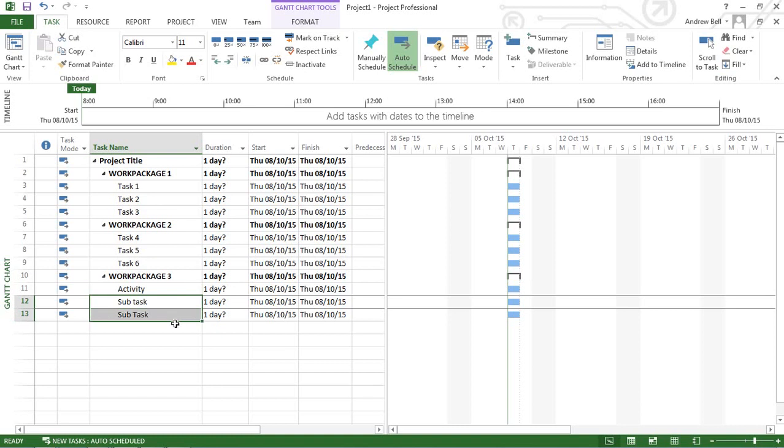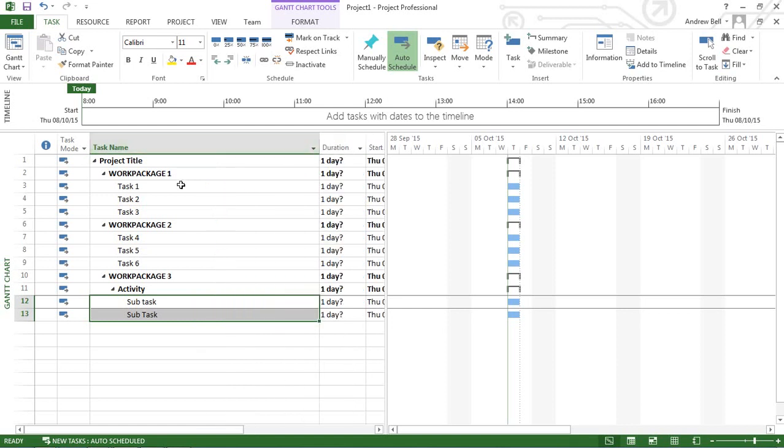I'm going to indent these subtasks underneath that activity to show you four different levels in the project. Microsoft Project can actually have over 65,000 different levels. But as you can see, every time we indent them, it moves the text further to the right. We're actually limited to the number of characters we can put in here. So in practical terms, when we go beyond 35 levels, you can't actually read the task names.